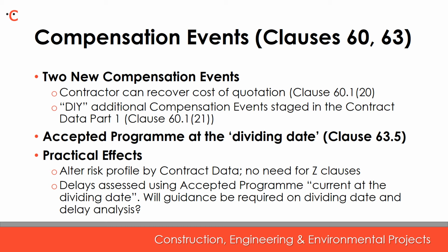For the purposes of assessing the effect of compensation events, there is also the introduction of a dividing date principle, whereby for compensation events arising from the project manager or supervisor, the dividing date is the date of the original communication. And for other compensation events, the dividing date is the date of notification of the compensation event. The purpose of the dividing date is to ensure that assessments will usually be forecasts of the work yet to be done and not retrospective.